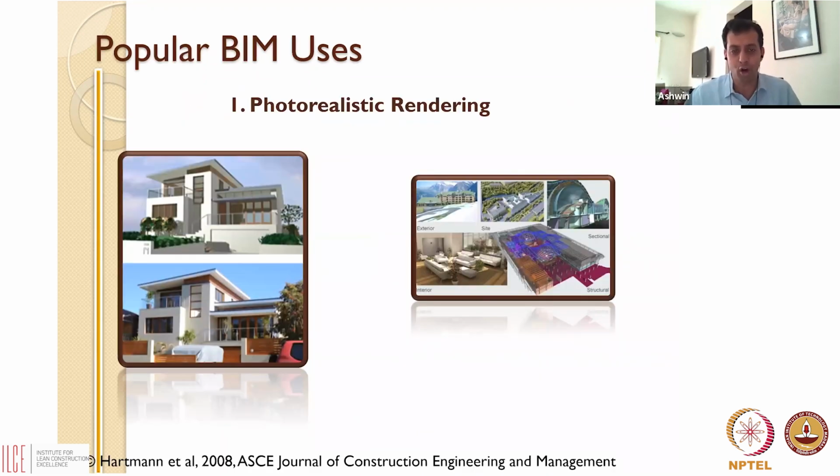First of all, one of the reasons why there are delays on construction projects is that when the structures come up, once clients can actually see those structures visually, they realize that they would like some changes made. It's very difficult for them to understand blueprints, but when they see the structure in real terms, that's when they decide that they would like some changes made. And as and when they recommend changes, that causes delays in the process and possibly an increase in costs. So one way in which we can avoid these changes is to start building early on very realistic life-size digital models of these buildings that clients can explore, so that they can minimize the extent to which they make changes later on.